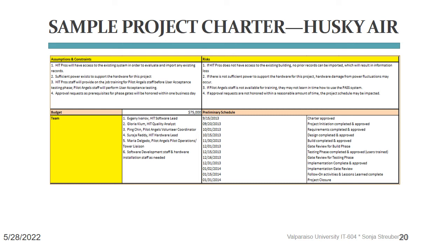But any information that you're seeing in this project charter, and that includes any scope information, any target information, any assumptions and constraints, risks, budget specifically, and schedule specifically, requires really a change request. And this is the project change management knowledge area that we have discussed earlier.